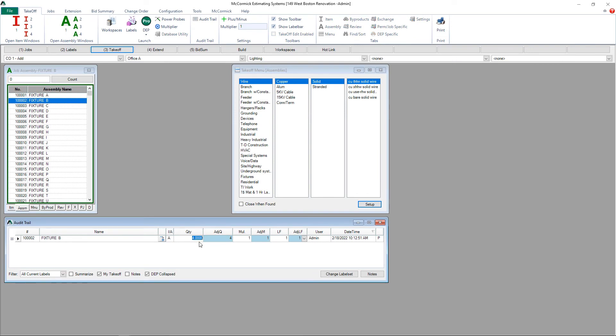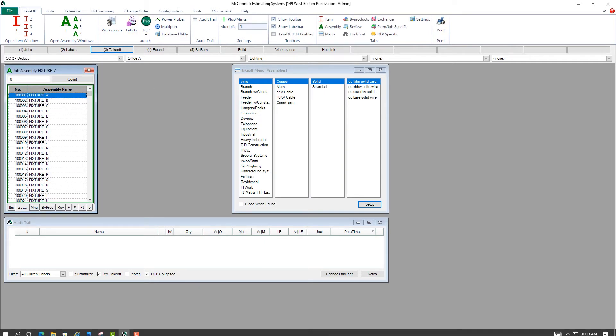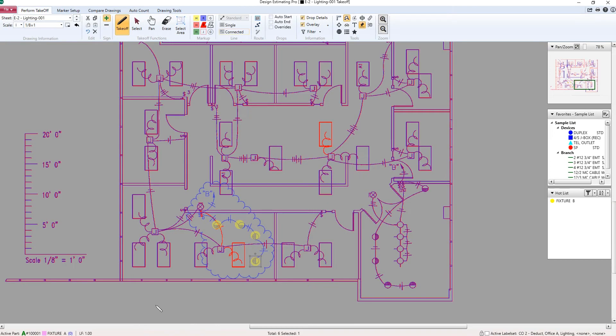Looking back at the audit trail, of course, that's recorded here for the Change Order 1 Add. Next I'll switch to the Change Order 2 Deduct. And this time I'll do a negative takeoff on the plan by switching to the negative sign in the ribbon.